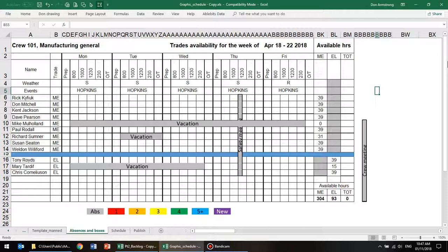And you should use some common sense. You need to minimize the number of times the jobs stop and start. It doesn't make any sense to start a 40-hour job on a Friday afternoon, for example. Now, scheduling is not an exact science. The schedule should be filled in as completely as possible, but you know it's going to change, so don't worry if you can't fill in all the boxes.